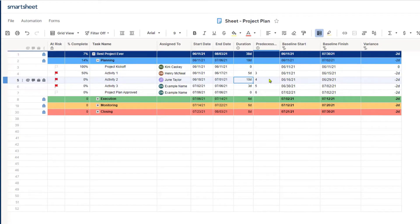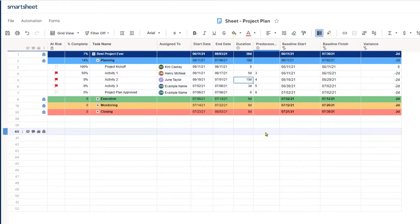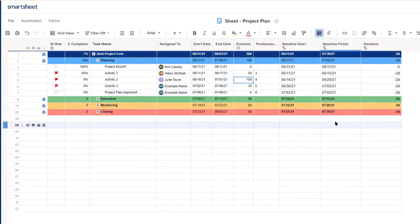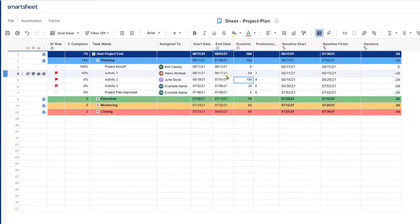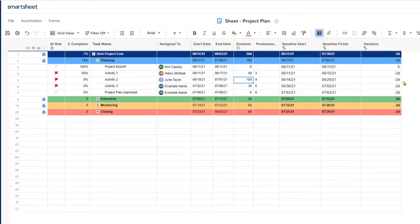A predecessor task comes first; a successor task comes second. It automatically updated the dates based on me extending that task by two days. Now if you take a look at the baseline start and the baseline finish, they're going to remain the original dates. When I set that baseline, it locked those dates in and it's now going to show me the variance. Because my work for activity one is now going to end on June 17th instead of the originally planned June 15th, it shows that we are two days behind schedule — and that is showing for each of the tasks that were linked to that task.